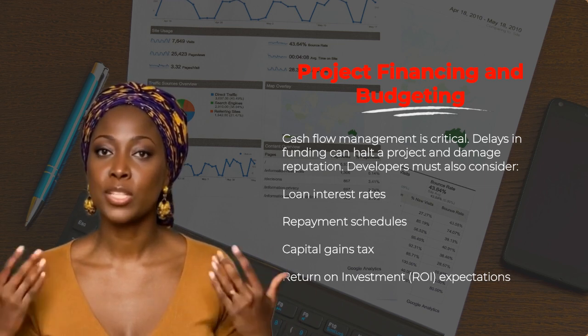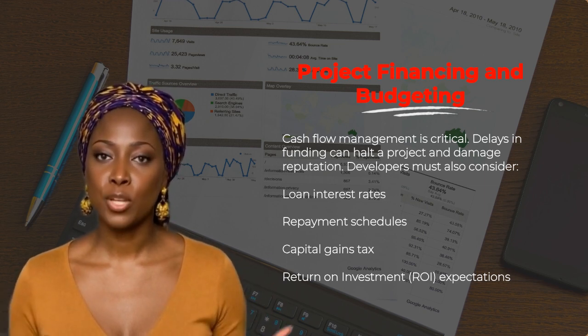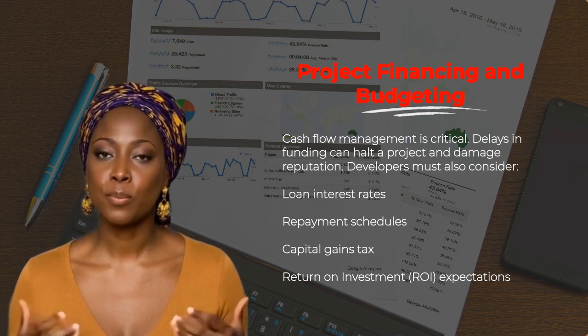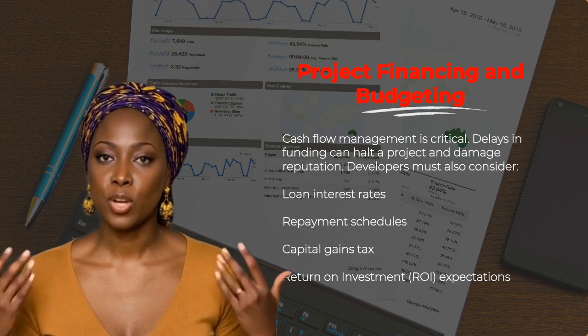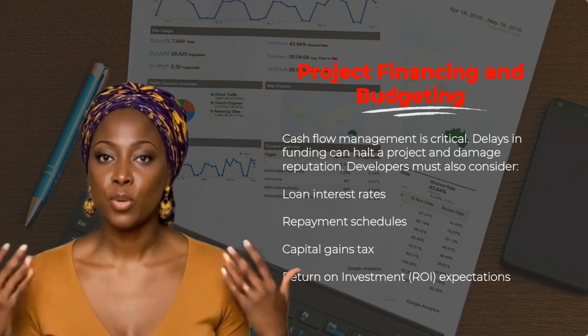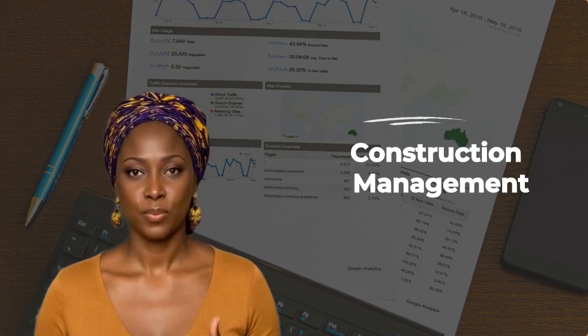Cash flow management is critical. Delays in funding can halt a project and damage reputation. Developers must also consider loan interest rates, repayment schedules, capital gains tax, and return on investment, ROI, expectations.